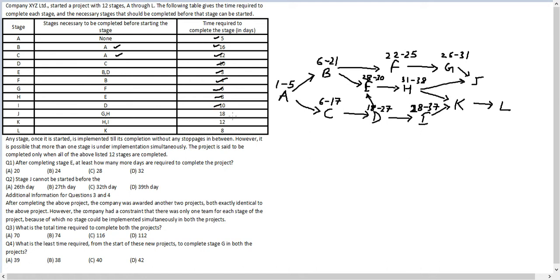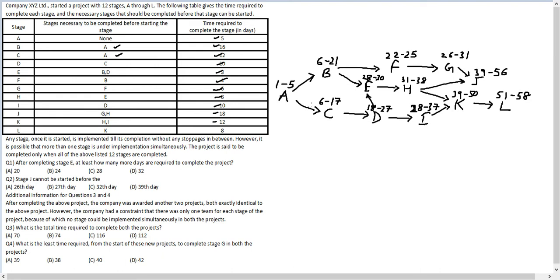I takes 10 days, going from day 28 to day 37. J takes 18 days; the constraints are G and H, so it starts on day 39 and goes until day 56. K takes 12 days, starting on day 39 and going until day 50. Finally, L starts on day 51 and goes until day 58. We now have the precise days on which each stage takes place.